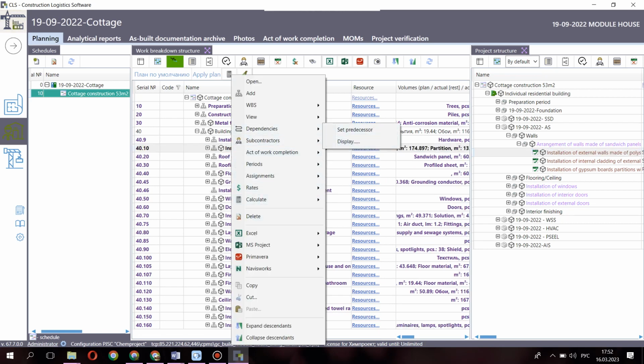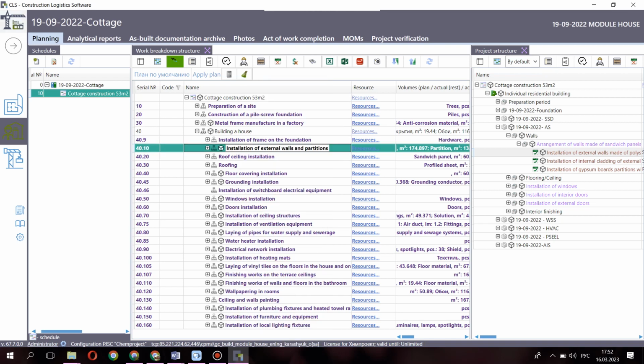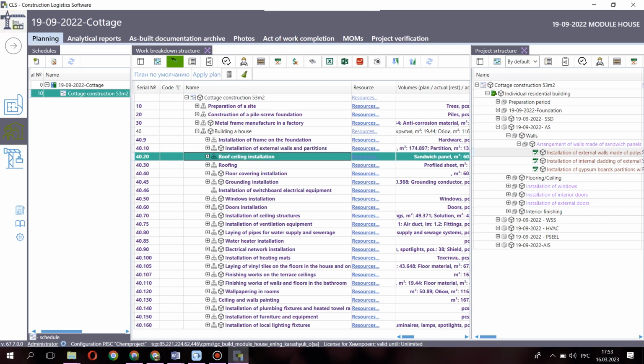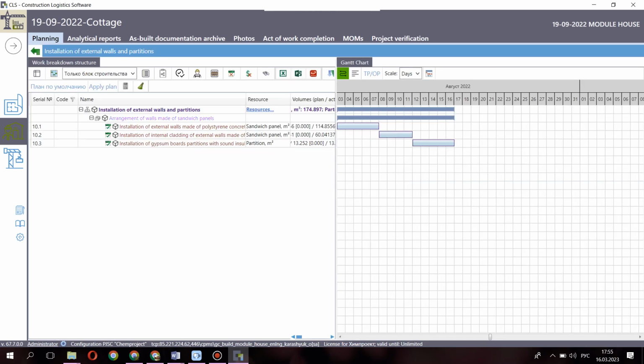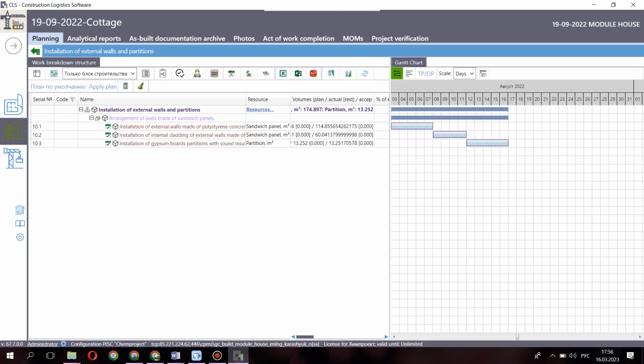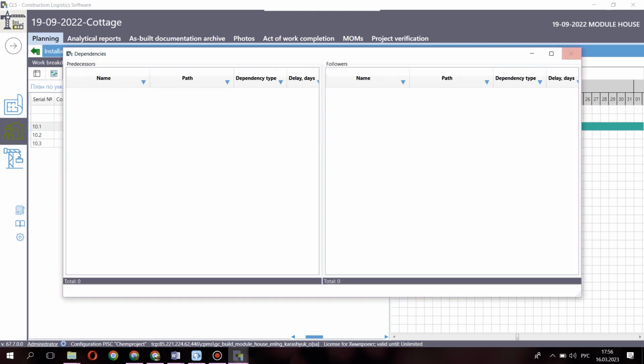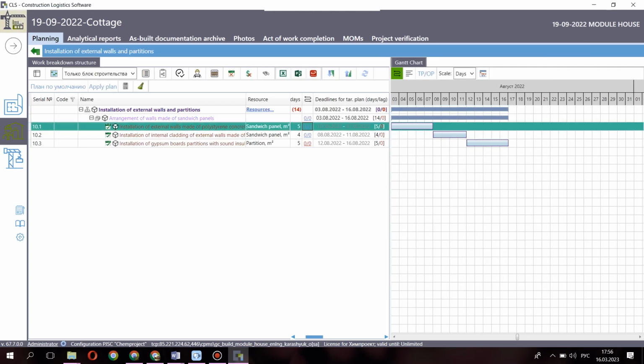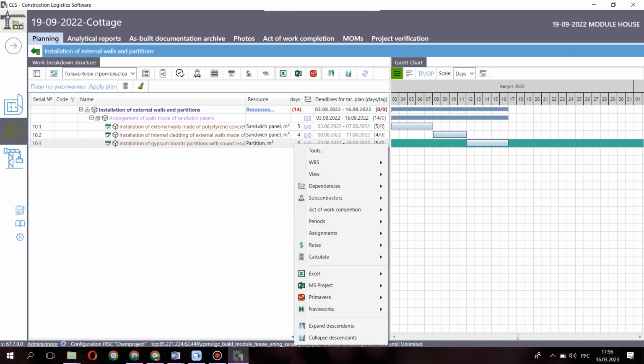At the lower level of planning, temporary links can only be formed within the division and are established between assignments. A construction and installation schedule is formed inside the division when calculating the time for work performance on the division.